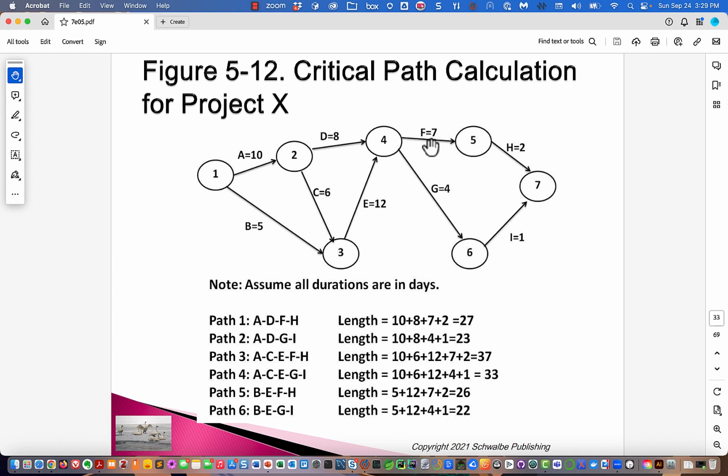Okay, so that's the kind of thinking that delays are not as important equally all over the project, that when you know the critical path, then you have the latitude to make strategic decisions. And as we go through a project and say some things take longer than we think, okay, we can update this so that we can know at any one point what the critical path is now, because the critical path can change.